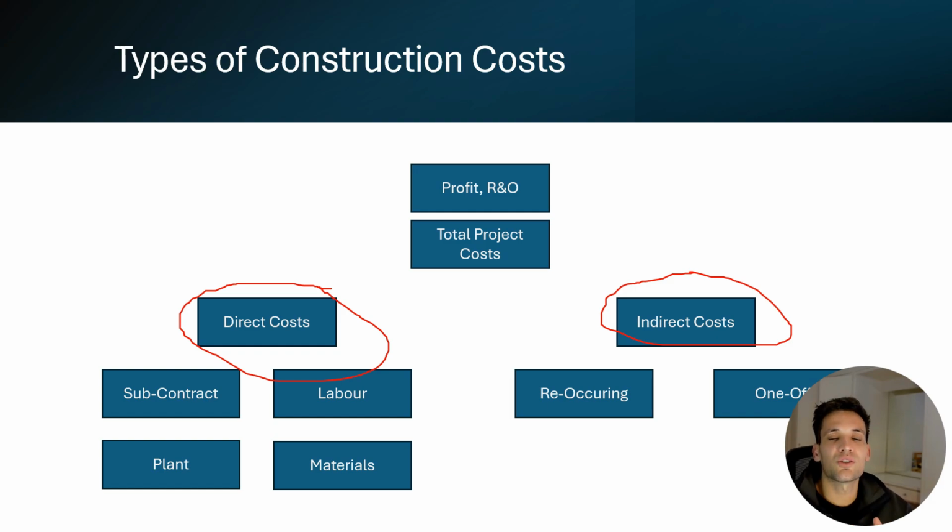So that's your labor costs. And then you've got your materials costs. So your materials costs are things like permanent or temporary materials required to complete the project. So concrete, steel reinforcement, if we're doing earthworks, any imported quarry material, for electrical works, electrical cables, conduits, and steel beams for a steel structure. So those are all material costs.